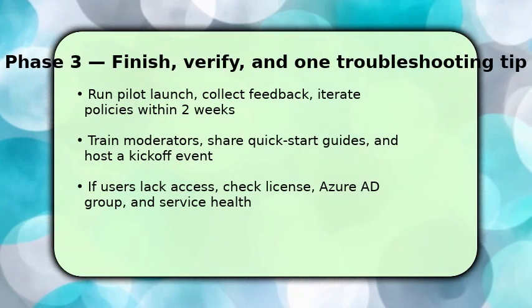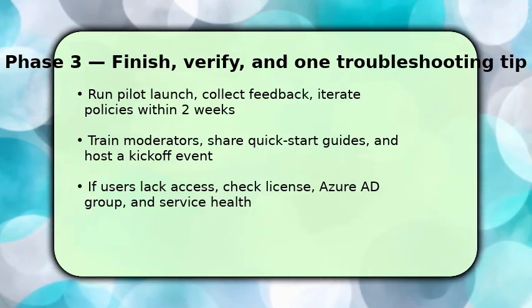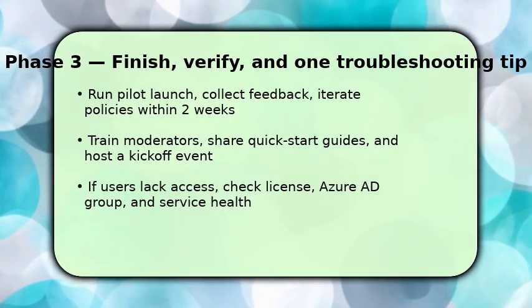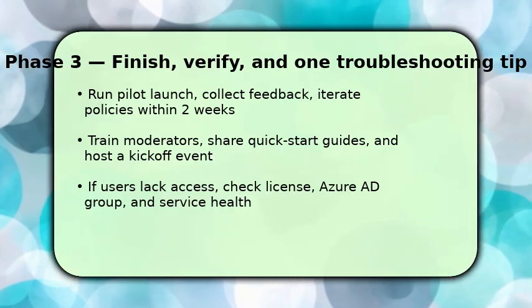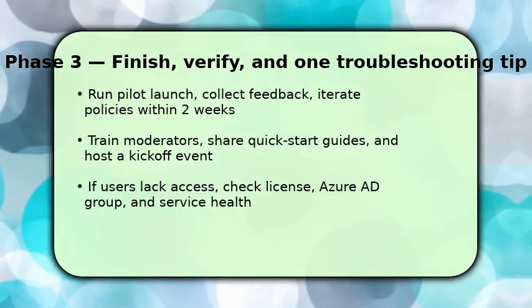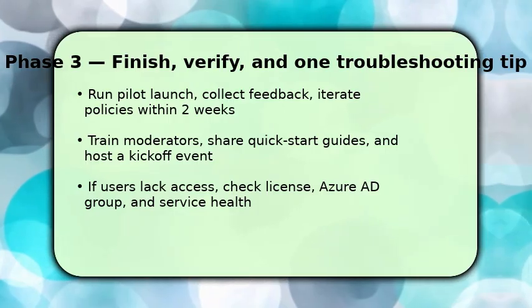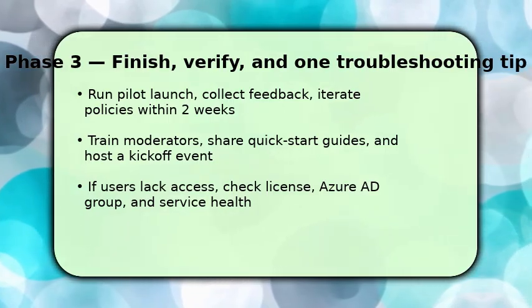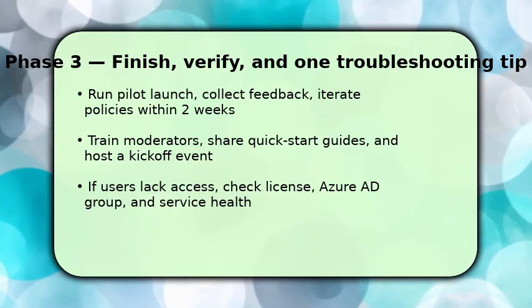You finish by executing the launch and preparing to fix common issues. Run a controlled pilot, gather feedback, and iterate governance and templates within 2 weeks so adoption ramps smoothly. Train moderators, publish quick start guides, and host a kickoff meeting to model behavior.